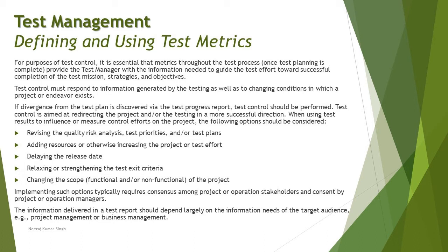If divergence from the test plan is discovered via the test progress report, test control should be performed — deploying test control actions which might be predefined by the test manager. The test manager should plan for standard issues and deviations from schedule and write specific control actions to deploy. Test control is aimed at redirecting the project or testing in a more successful direction. Factors the test manager should consider include revising the quality risk analysis, test priorities, or the test plan, and adding resources to increase the test effort.